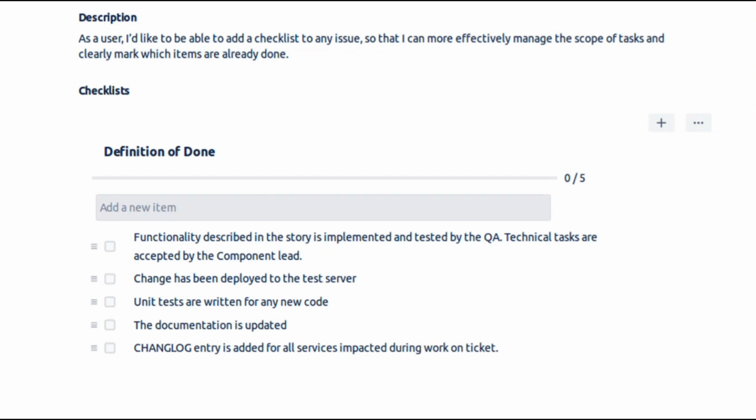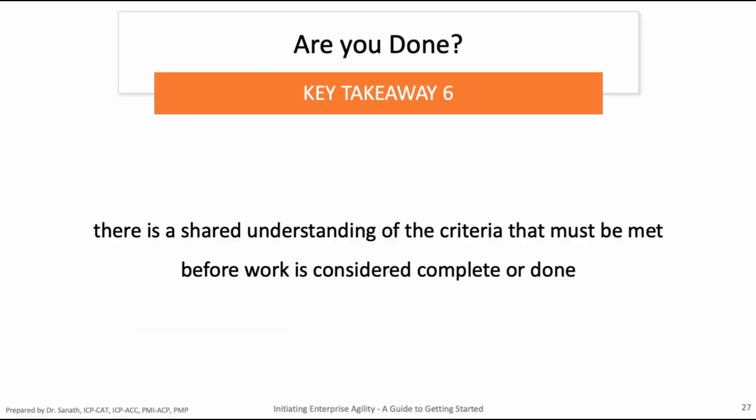So this definition of done is a very, very important criterion, and it may differ from project to project, because you have different clients. It might even differ from requirement to requirement. For example, if you're preparing a proposal, the definition of done could be different. Maybe you need to get your endorsement from finance as far as the cost is concerned, and you've got to get your immediate line manager to confirm that you've added all the required line items.